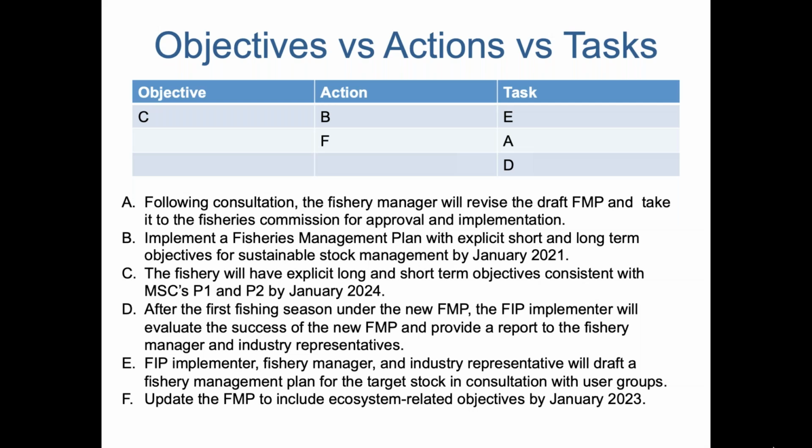But if you've got a comprehensive FIP, you want to avoid having 50 different FIP objectives. You might decide to set those objectives a bit more high level. That's all we were suggesting, maybe more from the point of view of a comprehensive FIP, and in any case it really is up to the FIP implementer. The point is to think about it, linking it to the PIs. If you're having difficulty determining what you want your objectives to be versus your actions, thinking about it at the level of the performance indicator, the most granular level for an objective, is a good guide.